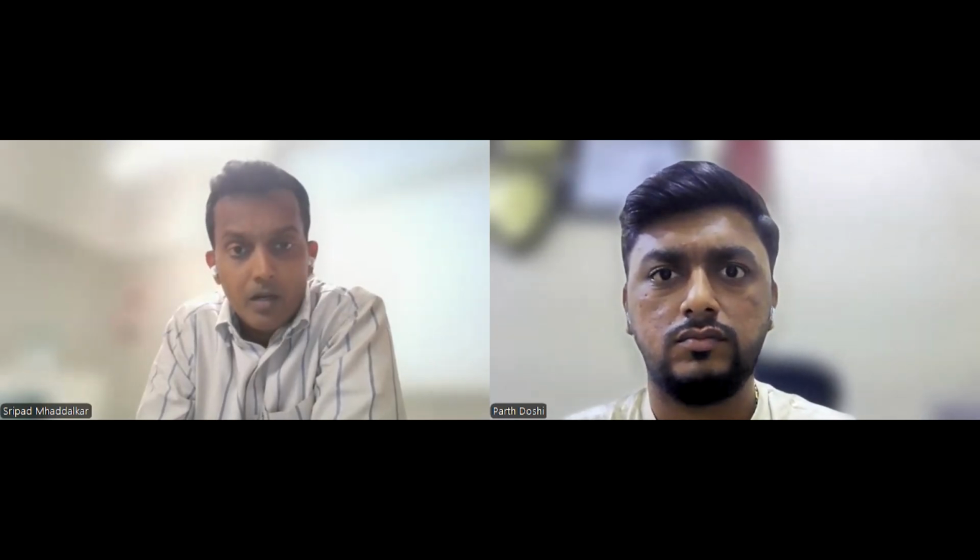What you have to do is you should have some milestones set up in these 2 weeks, wherein there should be the RPA project or the program manager having a stand-up call wherein he's checking if the PDDs and STDs are reviewed. Both are signing it off, like the project team and the support team, so that you have a conclusion saying yes, the KT is done with the documentation.